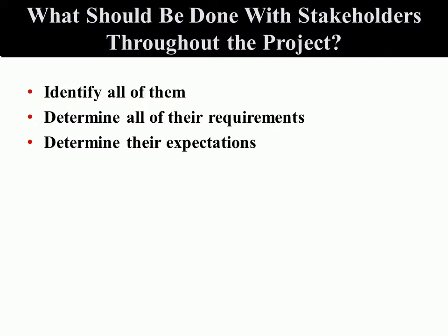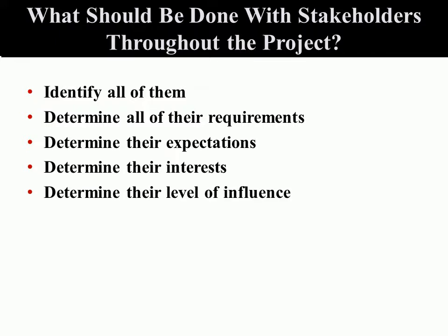You determine the expectations. Now, all of this is a sort of preliminary planning. You don't get into much detail. Whatever detail is given, you actually accept. But this may overlap somewhat with collect requirements, which is a specific process under scope management. So here you may ask stakeholders questions that you may repeat later, but with further details. What you want here is a degree of appreciation of what their requirements are, what they expect from the project, what their interest is, their level of influence, who can shut down the project, who knows who.